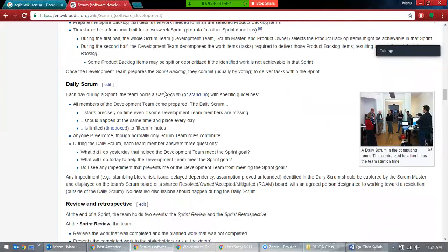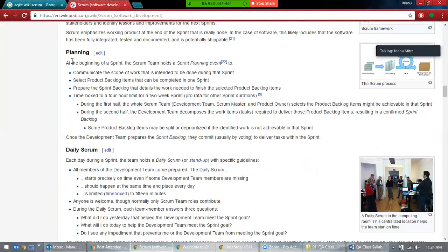In this, it's kind of a voting session. Let's say they are discussing one user story, and suddenly a developer says 5. That means 5 days. The Scrum Master says no, that's not possible, we don't have that much time, we cannot take 5 days. That means it includes 3 days of development and 2 days for testing; that's what 5 means, testing is included. So we say no, that doesn't work, we don't have that much time. Take it as 3.